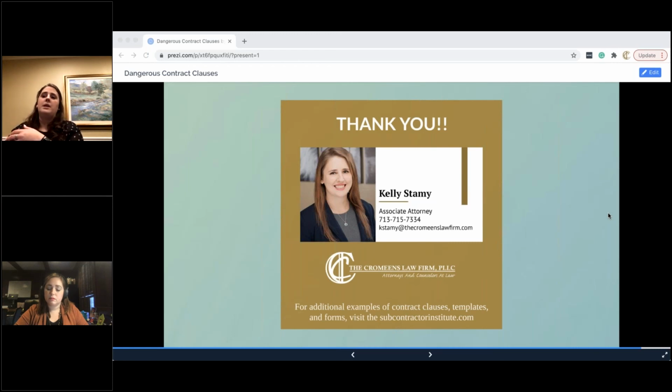So if you're someone that's coming in on the ground floor here and you're doing foundation or land clearing or whatever it may be, and you've been given wrong information, you can prevent that by taking a look at the project, going out there to that address, and inspecting it. See if you're getting the right information, even disguise it as, hey, I want to make sure my bid's right, let me go see what we're truly talking about. Then you would know these sorts of things, to as much extent as you can.